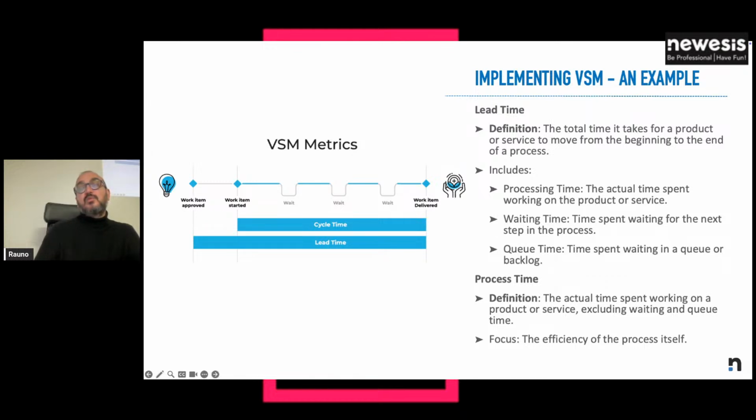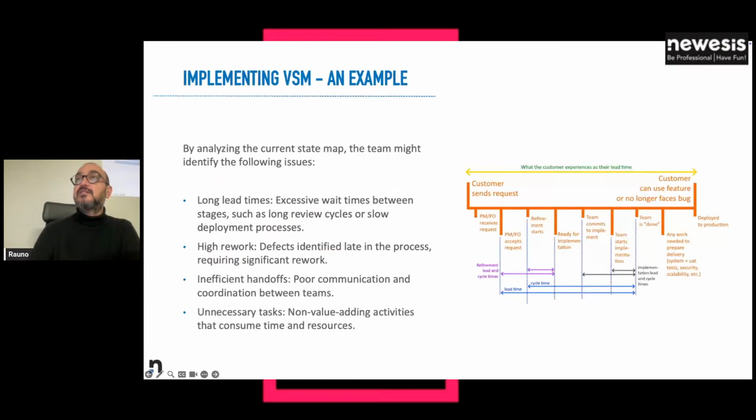If your QA team can process 4 features in parallel, you gain nothing in lead time by increasing your development team so that you can develop 15 features at the same time, because in any case, they will be queued after. So you need to identify the bottlenecks and try to adapt your flow. Sometimes the optimization of a value stream is to reduce the work in progress in steps that are capable of doing more, because this will just cause a queue in the next phase.